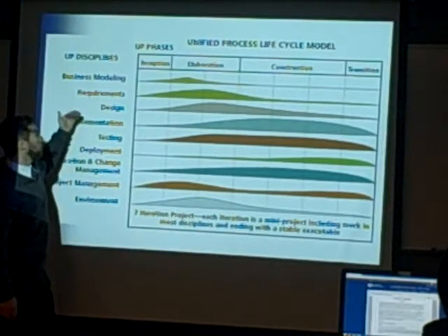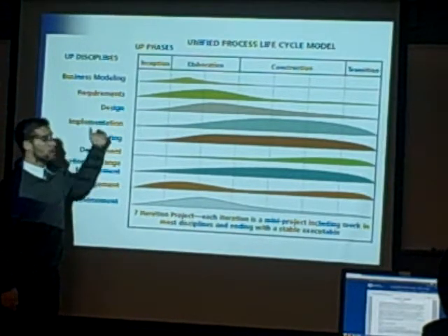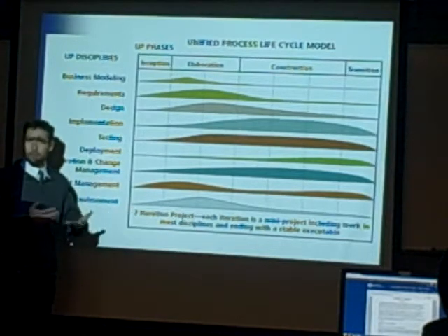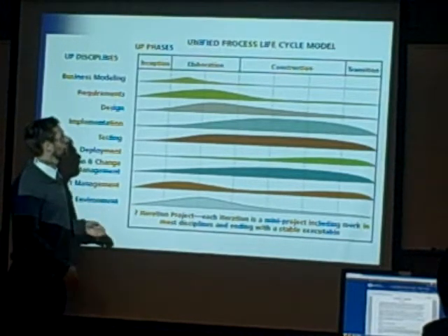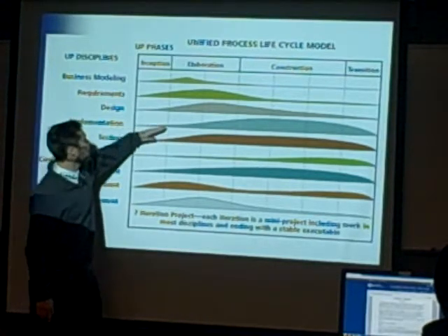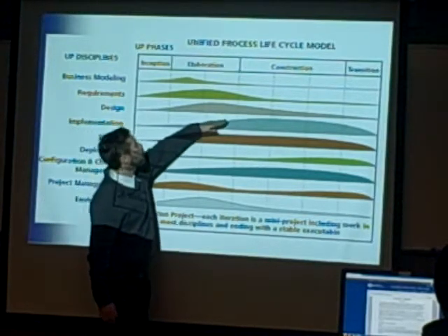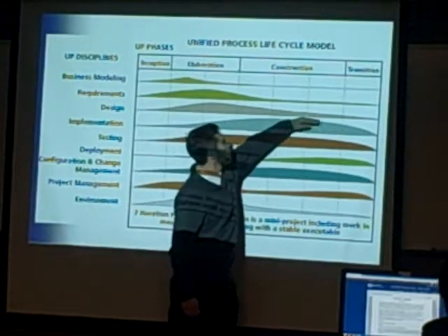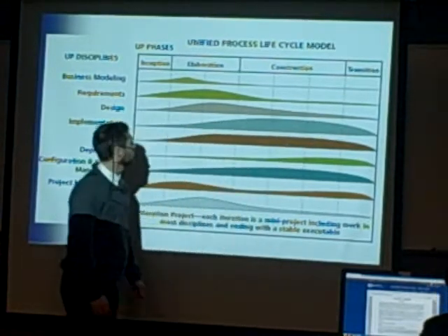Implementation, we talked about that as building, actually writing the software. Well, you can't build something that you haven't planned for yet and gotten the requirements for yet. So obviously the programming doesn't ramp up until partway through the project, and then it stays really high throughout the end of the project.